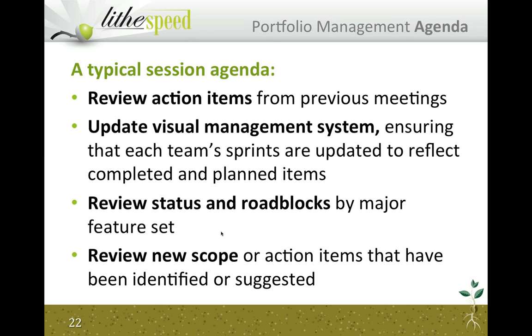So we're discussing some of the blockers we might have noted. After the teams have moved things, they're often discussing significant events from when they moved things that they need to highlight to the rest of the group, things that would foment further conversation. And finally, we might take a look at any new things that have been identified going forward. And lastly, discuss action items that we might need to take for next time.